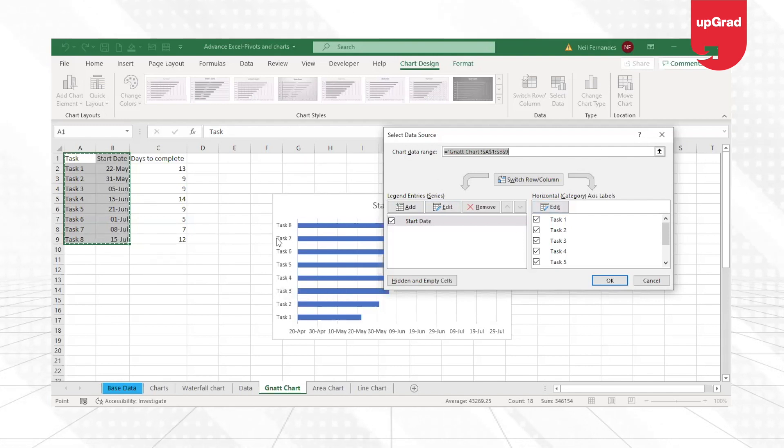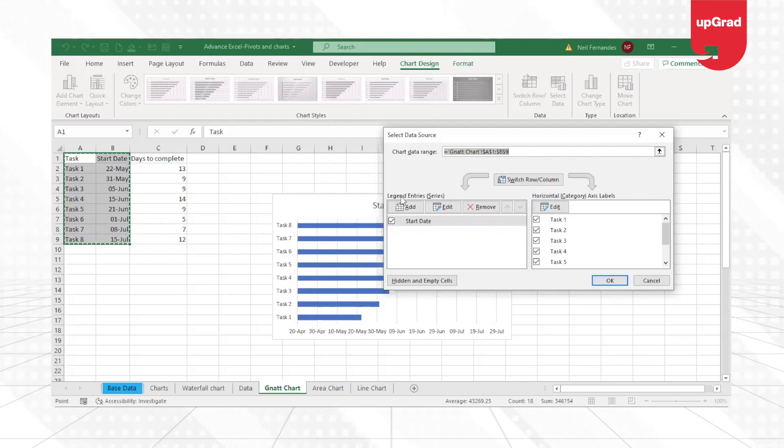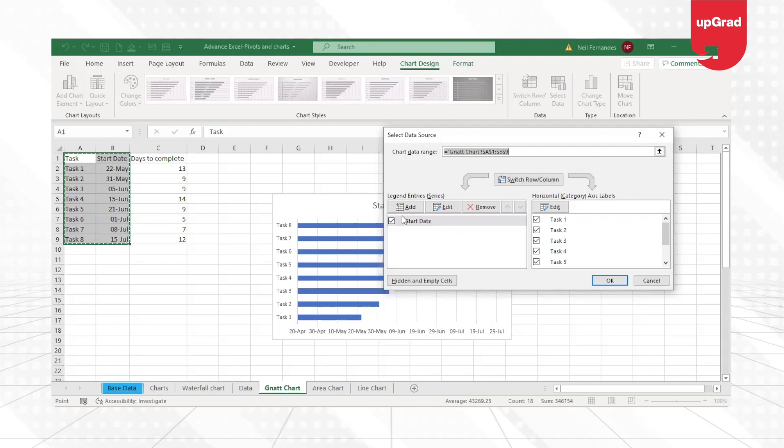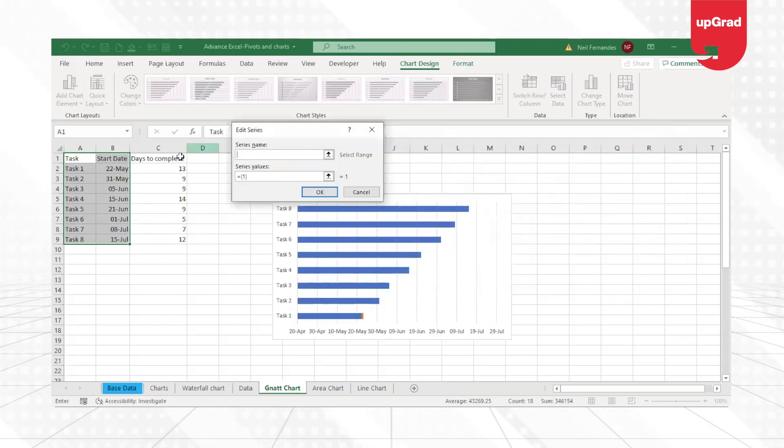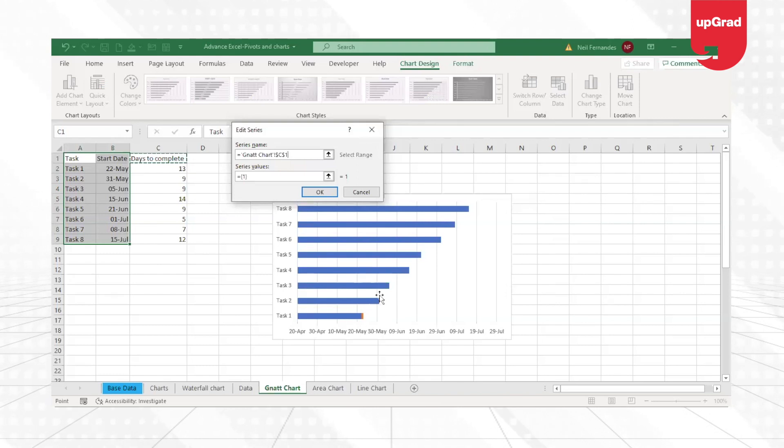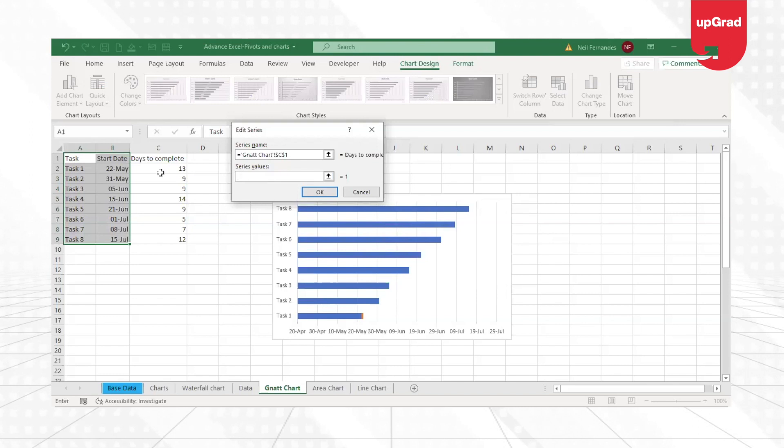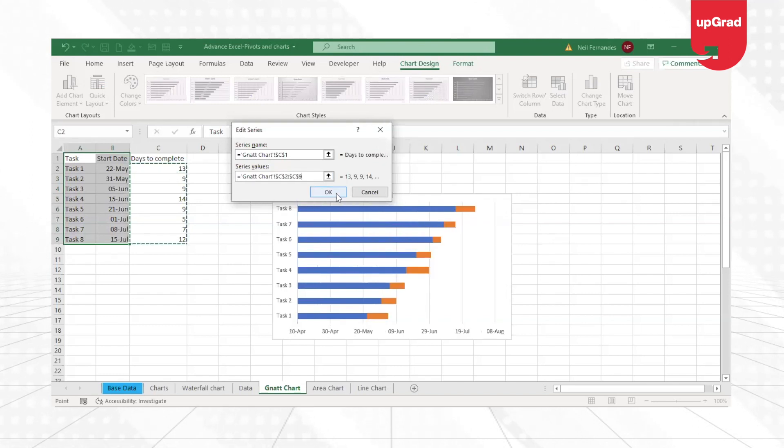Now that I have the task given here already, what I need to do is add one more data to the legend entries, and that is the days to complete so that it automatically adds one more bar to this, and the series value is going to come from the list of values given here.